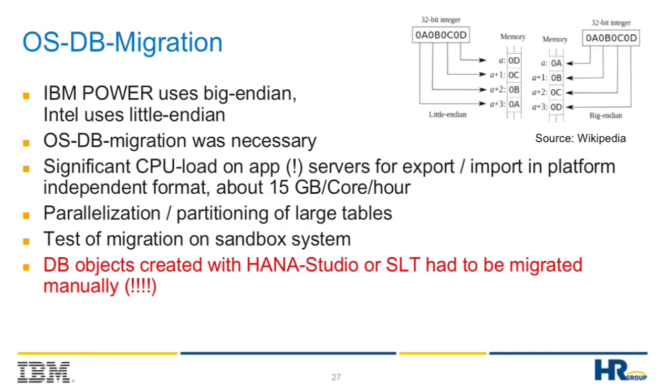So we did the export, and all worked fine from a technical perspective. We imported it for the first test migration and said to the line of business, go do your tests. Five minutes after he started his test, he came back to us: what the hell were you doing, IBM? The data is not complete there.